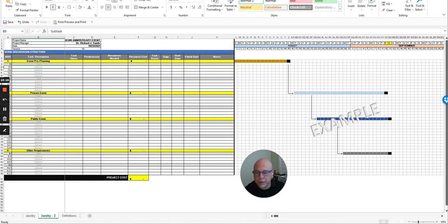And I just put in like your WBS1, WBS2, I think, yeah, there you go, WBS1, and then the first major task under that is going to be 1.1, and then you're going to have subtasks. The second major task under 1 is 1.2, and then subtask. And then the next phase or critical milestone, etc., all the way down.